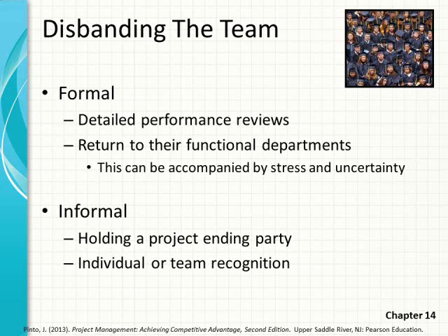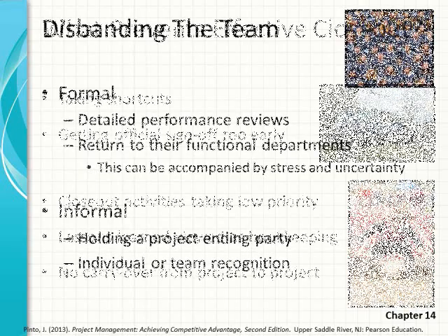It can be formal. Detailed performance reviews can be conducted, and then they can be returned to their functional departments. And this can be accompanied by stress or uncertainty because someone has become so familiar with their job as part of the project, and when it comes to an end, well, there's stress. And informally, you can disband the team by conducting an end-of-project party and with individual or team recognition.